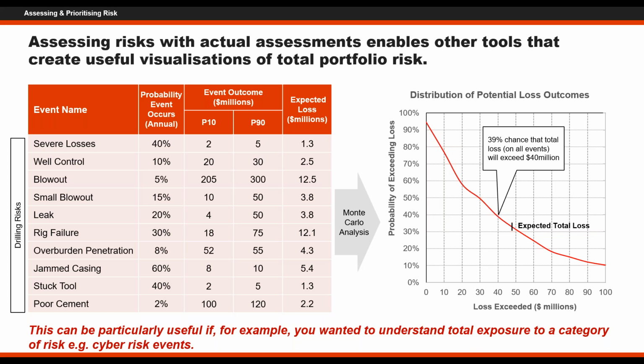Yeah. And what if we take just one example, let's say, data breach. So hackers stealing your customer data was the event in that table on the left-hand side, and the probability of that is, let's say, 60%. On the P10 and P90, the hackers may steal 100% of your customer data. If you have 10 million customer records, they may steal all 10 million. Or if you detect the incident quickly, then maybe you'll only lose a few hundred or a few thousand records. So your financial impact will vary depending on how many records they are able to steal.